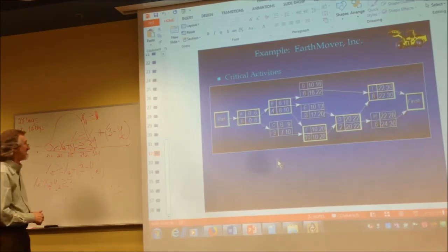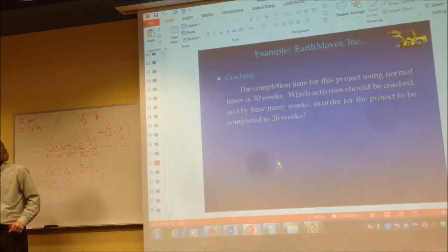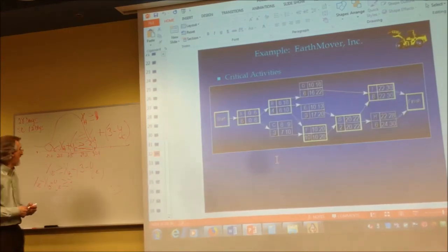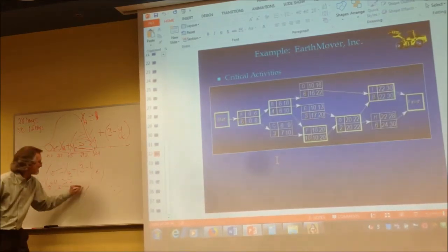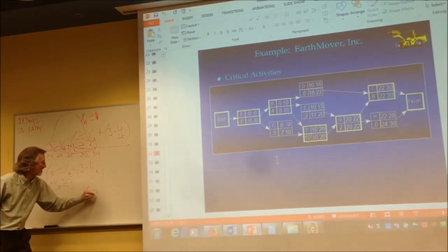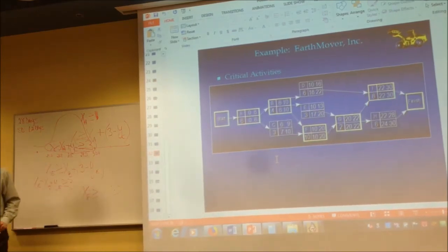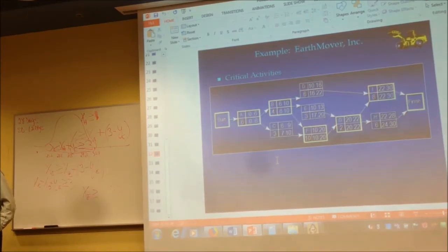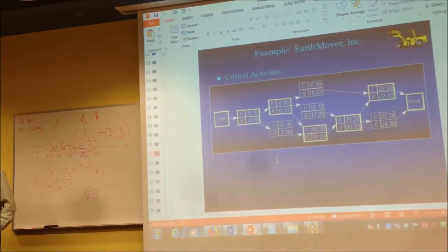All right, help me out. Let's do another one. One more. Here we go. You ready? We're going to do F. X sub F greater than or equal to, what precedes F? C and B? I hear B, I hear C. That's right.